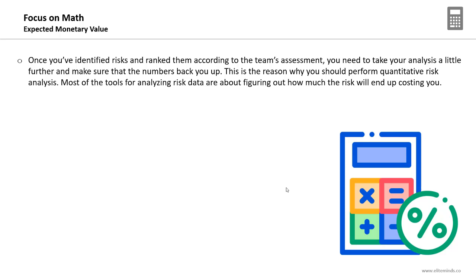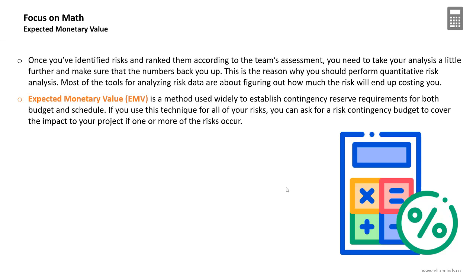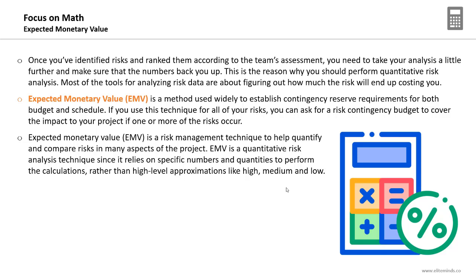Most tools for analyzing risk data are about figuring out how much the risk will end up costing you. The Expected Monetary Value (EMV) is a method used widely to establish contingency reserve requirements for both budget and schedule. It provides a scientific method of determining the exact required contingency reserves for your project. Using this technique for all your risks, you can ask for a risk contingency budget to cover the impact if one or more identified risks occur.